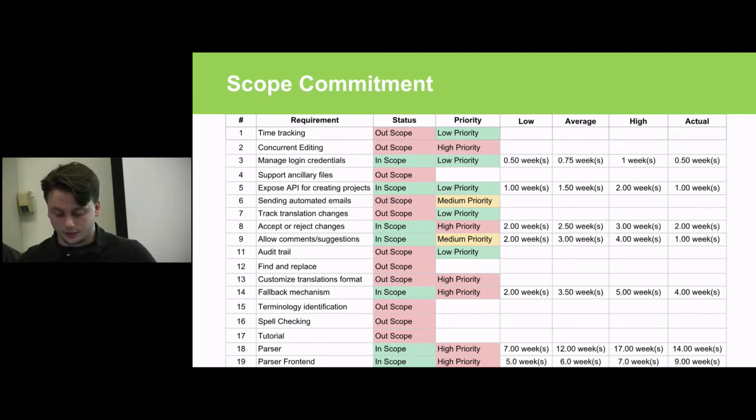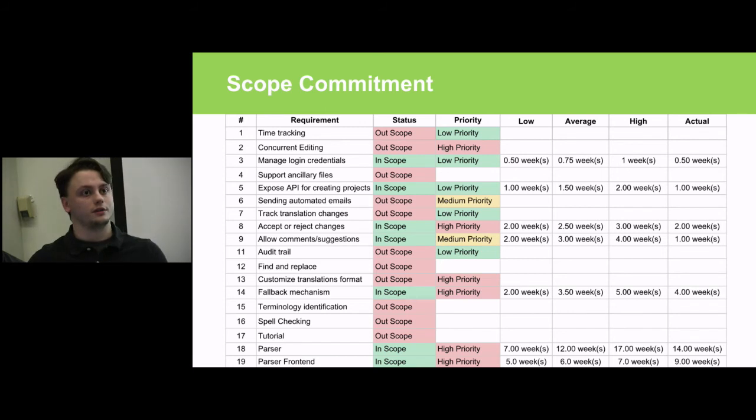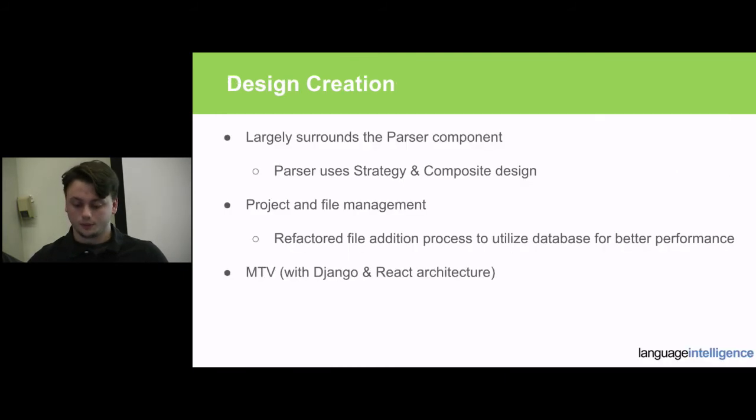mainly the issue that we had was figuring out how much time the parser was actually going to take. It was the real engine, the real mechanism that holds the backbone to this app, and we didn't really account for how much complexity it would have in it. In fact, there was a large period of time where we would go, we finished the parser, it's done, parser's done, and then we'd get another test file from our sponsor, which would break everything, and we didn't recognize there was a use case in there that we had to fix. And this actually happened for quite a few weeks. So we felt really bad about that. We really wanted to accomplish more than what we had, but we feel like we've done a fair amount as it is towards that goal.